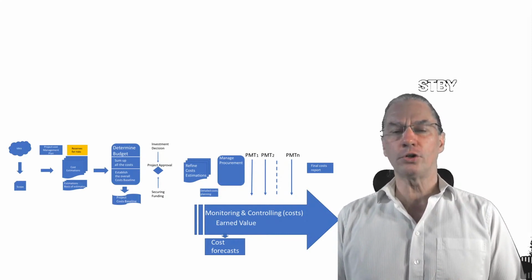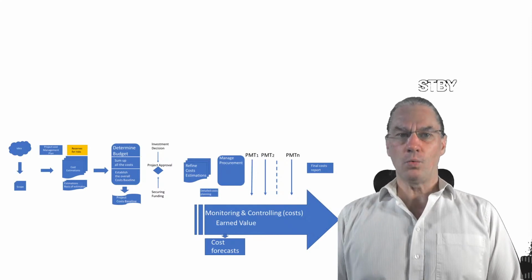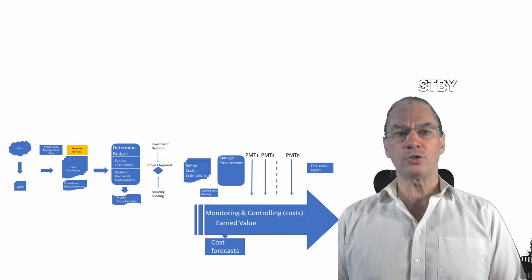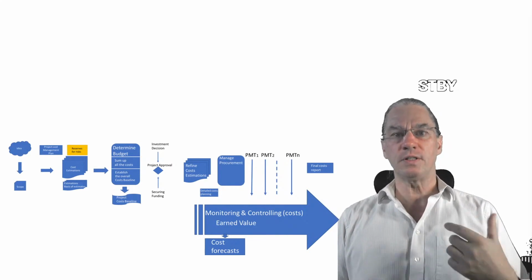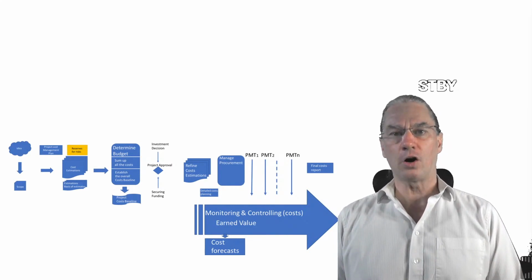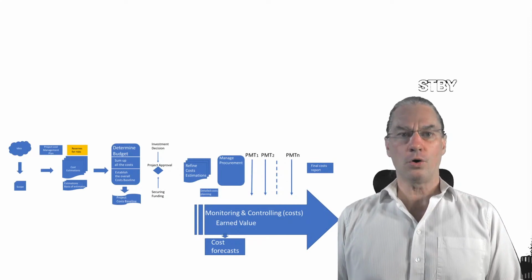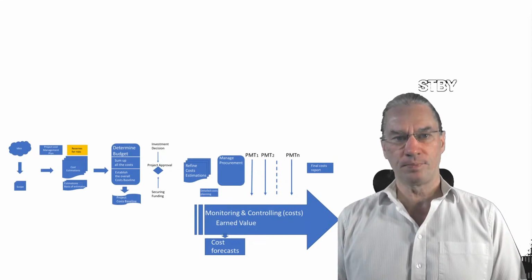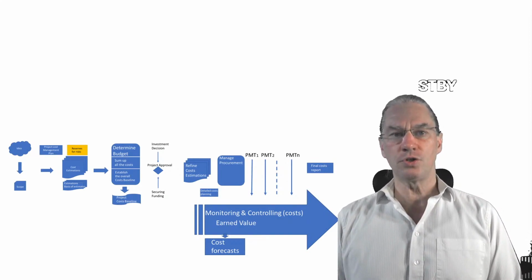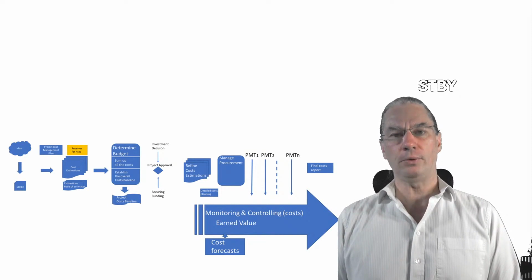With those documents, once we know how much it's going to cost, it's a good habit to add what is in yellow in my diagram: some reserves, or some margins. These are called contingency reserves, and we will see in a video how to go about this.